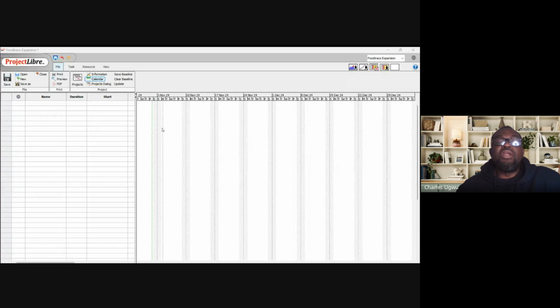If you want to work on Saturdays, then you have to use non-default working time. If you click on non-default working time, you should be able to select Sundays or Saturday as working days as well.